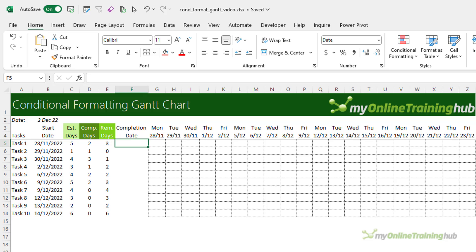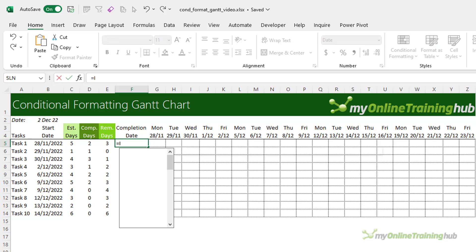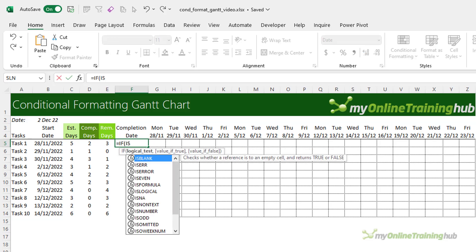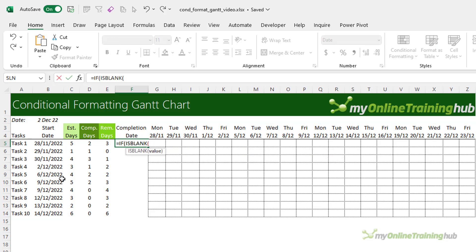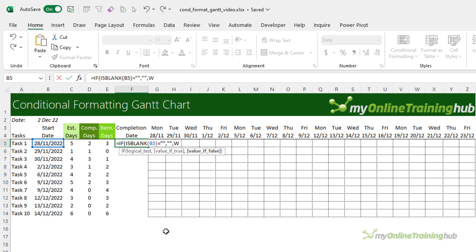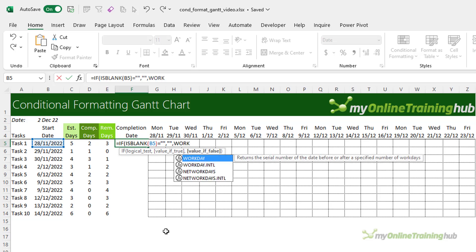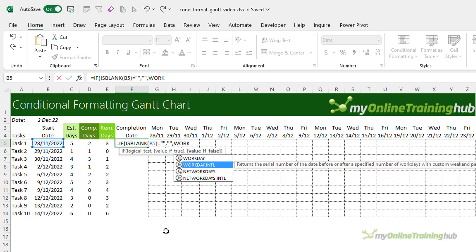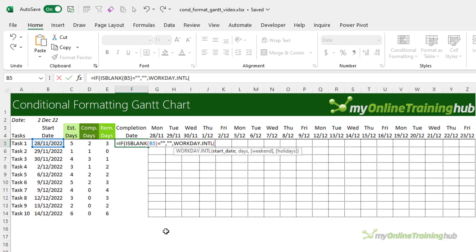To calculate the completion date, I'm going to use the WORKDAY.INTL function so that I can ignore weekends and holidays. But I'm going to start with IF(ISBLANK). I just want to check that this date is not blank. So if it equals blank, then I'm going to return blank. Otherwise we'll use WORKDAY.INTL. Now if you don't have WORKDAY.INTL, you can use WORKDAY. WORKDAY.INTL simply allows you to specify which days your weekend falls on. So my start date is here, and I'm just going to minus one so that it doesn't assume that my first day is already over.